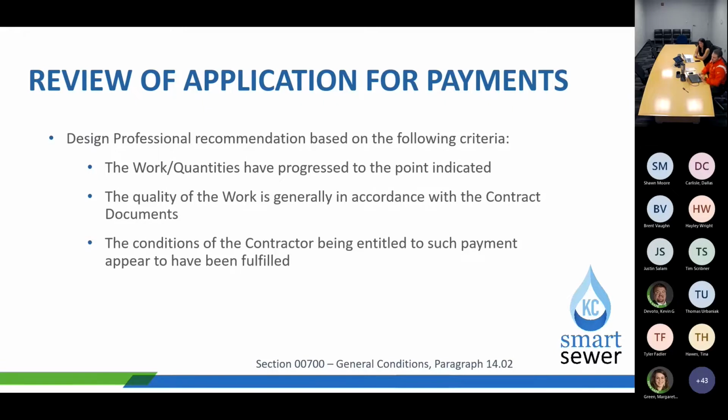And lastly, as a design professional or RPR, just make sure, like we stated before, that you're looking for correct quantities, that the work has progressed to the point indicated on the contractor's invoice, that the quality is in accordance with the contract documents, and that the conditions of the work meet this criteria as well.